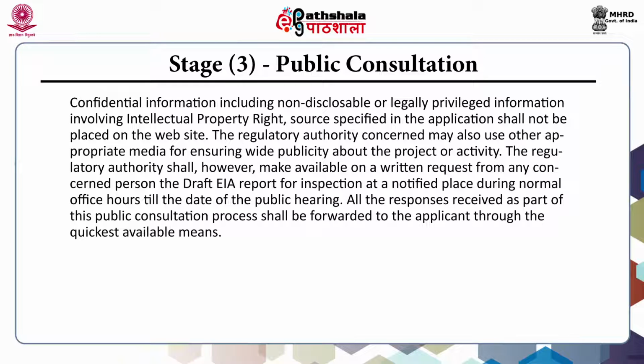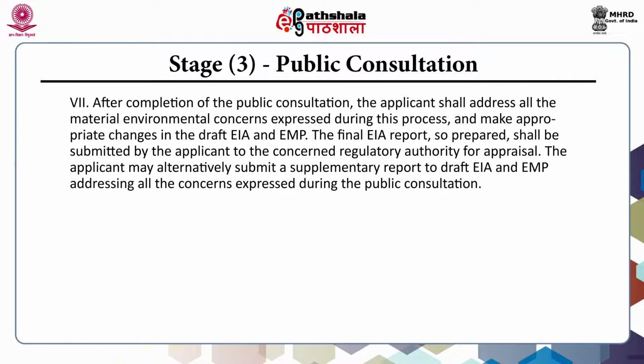All the responses received as part of this public consultation process shall be forwarded to the applicant through the quickest available means. After completion of the public consultation, the applicant should address all the material environmental concerns expressed during the process and make appropriate changes in the draft EIA and EMP. The final EIA report so prepared shall be submitted by the applicant to the concerned regulatory authority for appraisal.